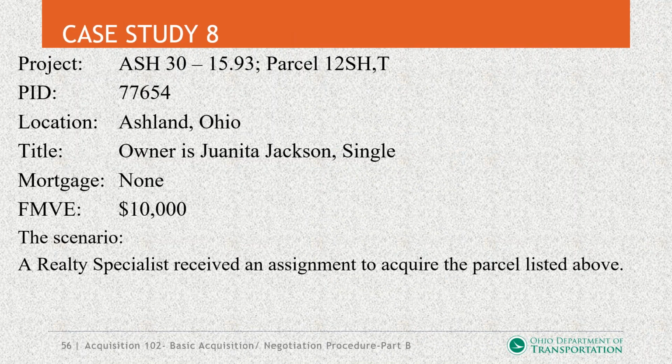Wayne, we have a question that's come in. Oh, good. It says, what if the improvement is an encroachment? If the improvement is an encroachment, then basically, number one, there's no compensation for an encroachment. And the property owner will be required to remove that particular improvement that's in the encroachment. Now, with that being said, is the encroachment permitted or not permitted? That would be the other question. But as it stands, if it's an encroachment, there's no compensation. They'll be required to get the item out of the existing right-of-way when that time comes.